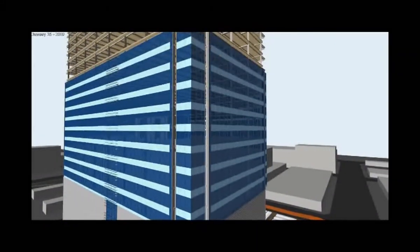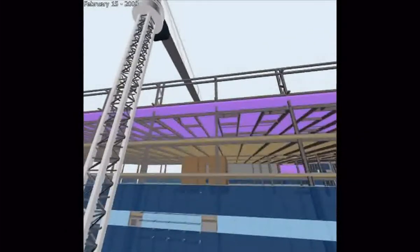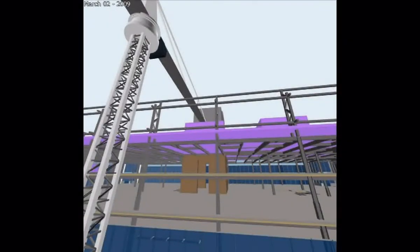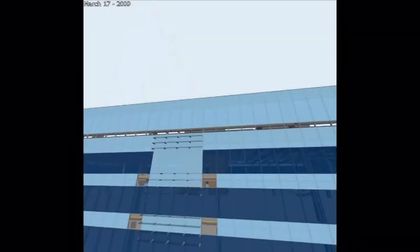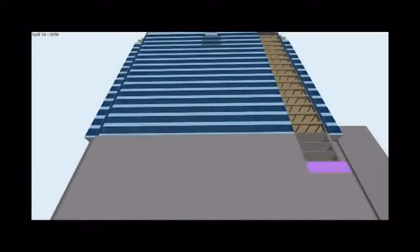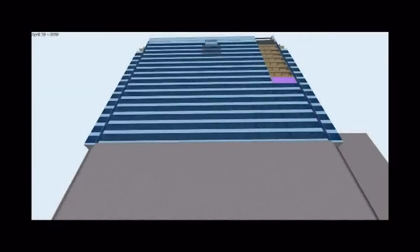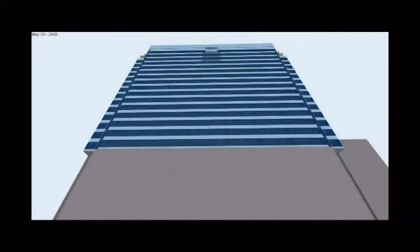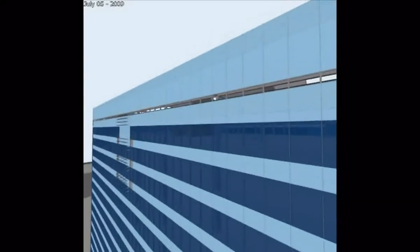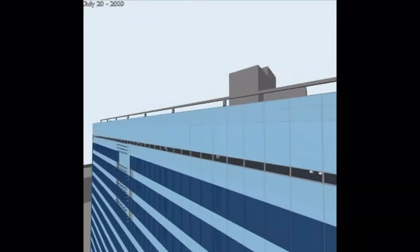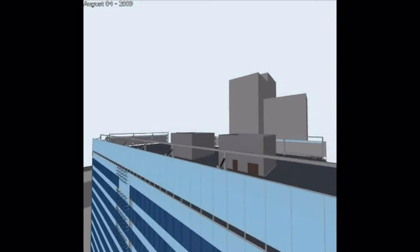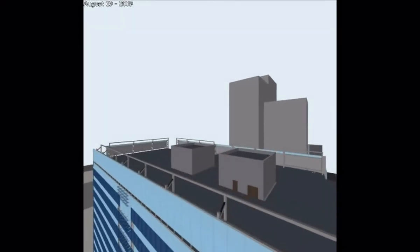Once the project is complete, you can actually do an after-the-fact schedule, where you can take a look at how the project really was built. You can do simulations and interesting comparisons — looking at where you originally planned to build versus how it was actually built, so you can pick up lessons learned and apply them for the next project. The owners can also use it as a marketing tool, showing how the project was built, and even use it to get funding for future projects.